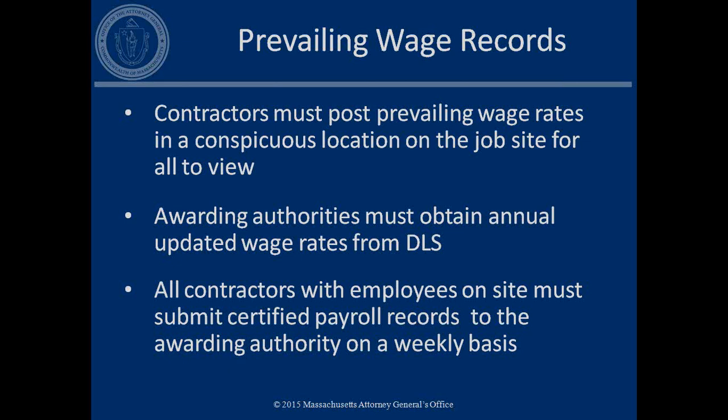So then the submission of certified payroll records is also of the utmost importance on a project. If a company is working on a public project, they're required to submit certified payroll records to an awarding authority on a weekly basis that show the hours worked, the names of the workers, the classification of the work they were doing, and how much they're being paid, along with their addresses.